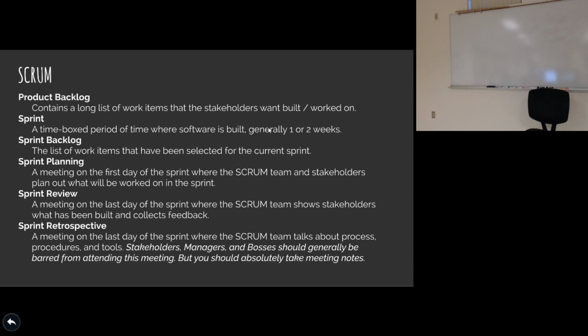It also means that if we royally screw something up and completely misunderstand what they said, how much work have we wasted? Well, we wasted 2 weeks. So worst case scenario, we wasted the sprint going in the wrong direction, rather than potentially spending a year going in the wrong direction. That's a lot easier to recover from, especially since the more changes you make without changing direction, the harder it becomes to go back.